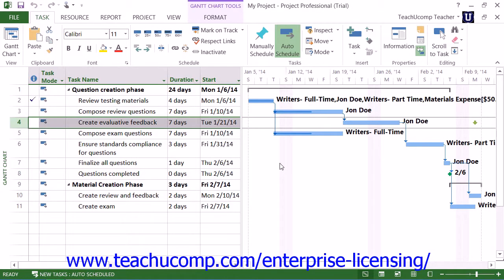Many new users of Microsoft Project accidentally make the mistake of using too many semi-flexible or inflexible constraints when creating tasks within a project file. This often comes from the urge to set a must finish on constraint or specify an actual finish date when creating their tasks, which will often produce an inflexible or semi-flexible constraint upon the task. The problem that often occurs when creating tasks in this way is that you severely limit the task rescheduling potential of Microsoft Project.